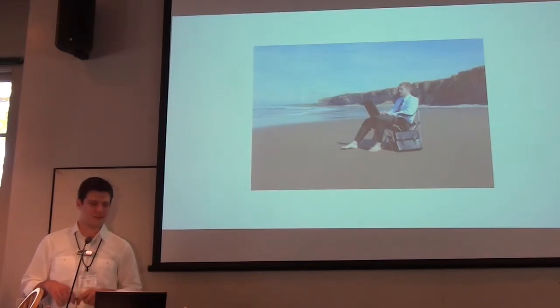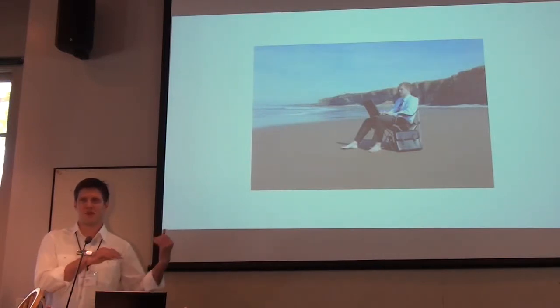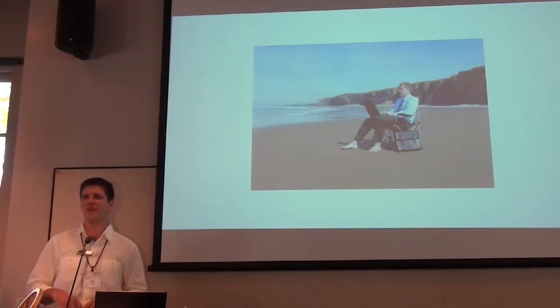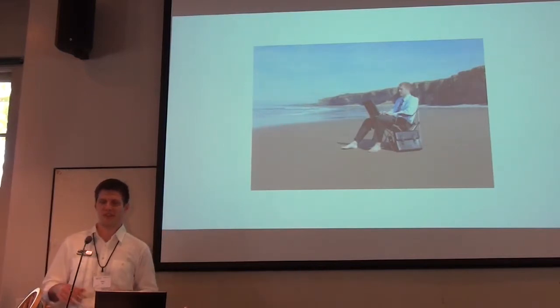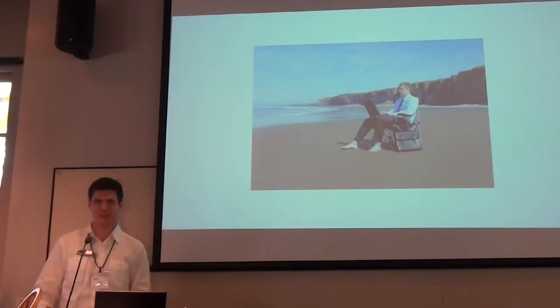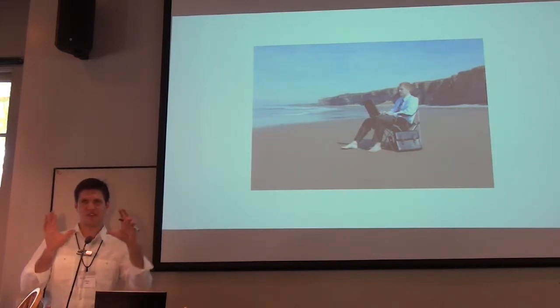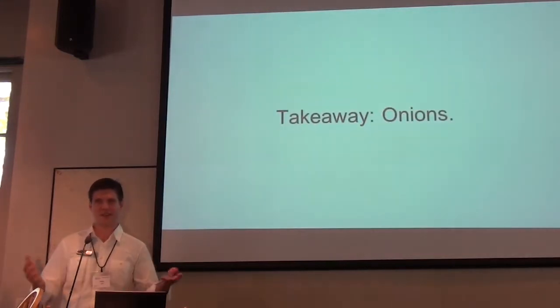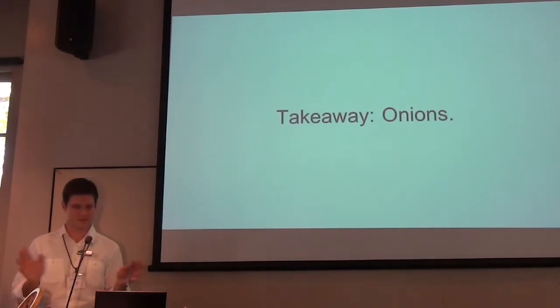And the funny thing is I thought my sphere was kind of round and kind of smooth. So the weeks before the holiday season, I was working for maybe a week and a half on implementing something called A/B testing. For those who are familiar with that, we really wanted to do like the big boys, like we want to do A/B testing ourselves and be able to change our product while it's launched. And it turns out with the rush schedule, we never could finish this, so it was all wasted work. It would have been much better to actually do my game menus, make sure my sphere was really round, and then be ready for shipping at that point. So my takeaway is like, the development process is onions. Just think of onions.